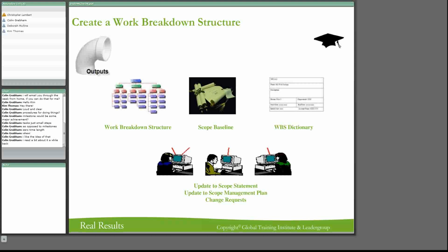We planned very roughly the whole outline of what the development would be, and then we took a small part of it and we planned that in detail. So we prototyped the whole thing in general, and then we kept on doing an iterative process. One of them, we had at least 3 iterations on, and we got down to more and more detail.